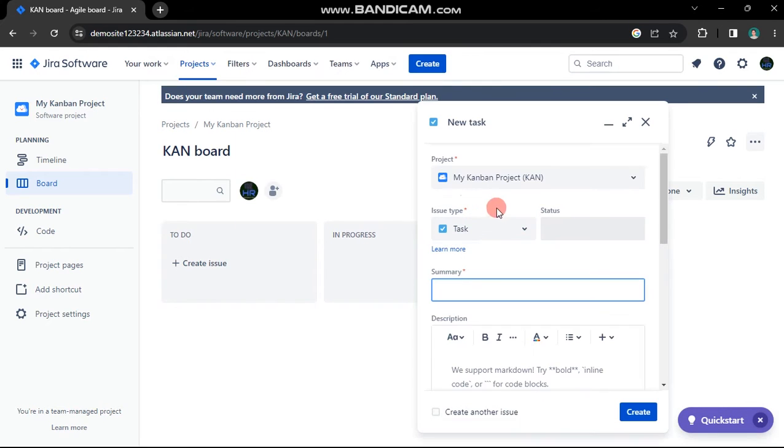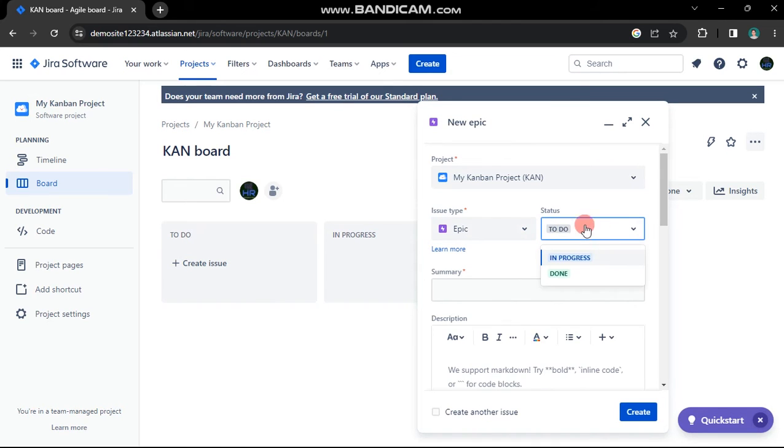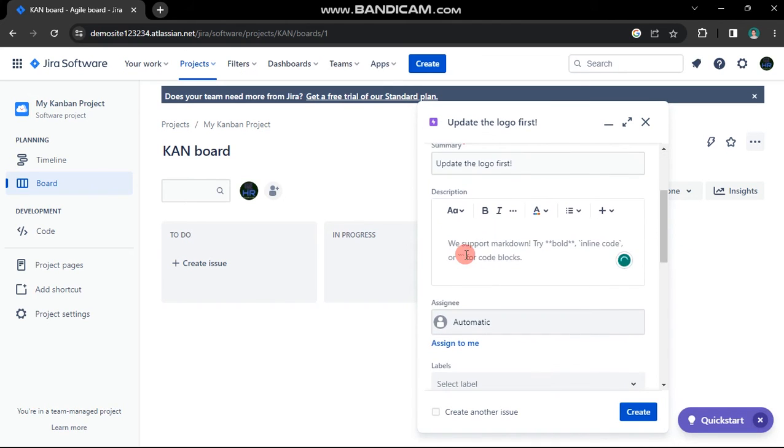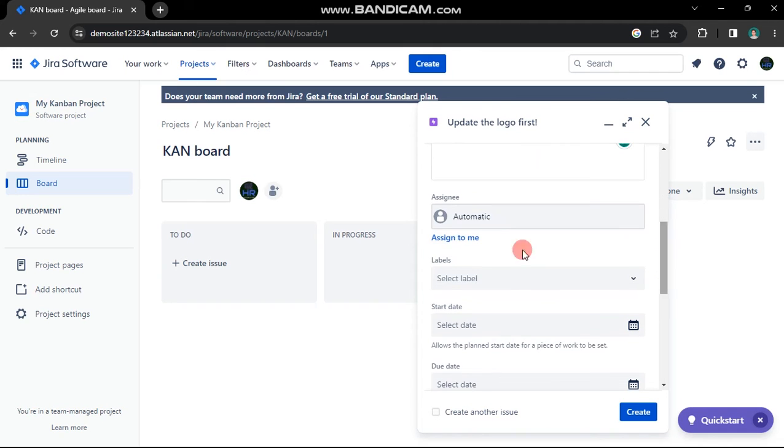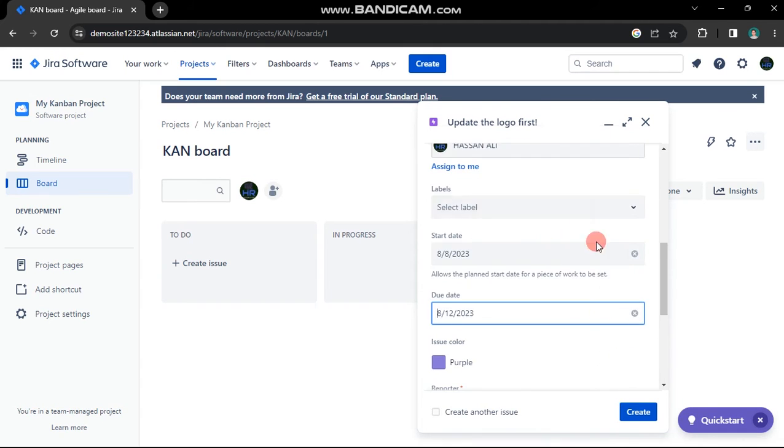A pop-up box will appear. Begin by selecting your project. In the issue type, select Epic and set the desired status. Craft a summary and description and configure other settings, including identifying colors and issue start and end dates.